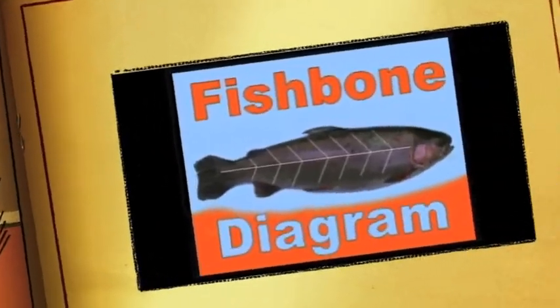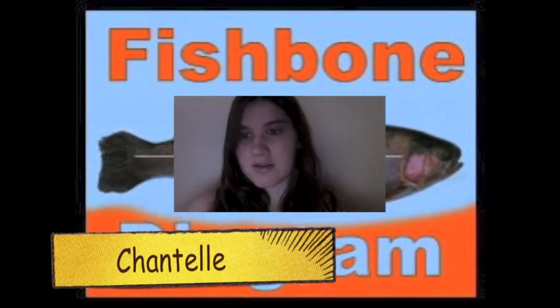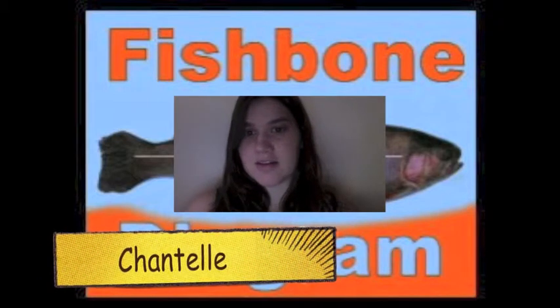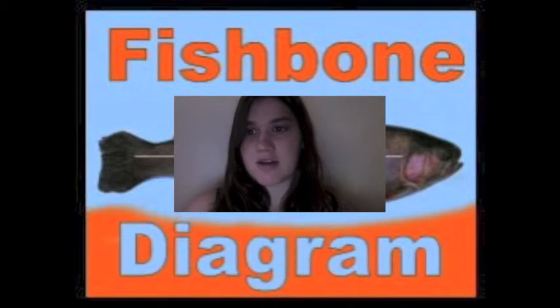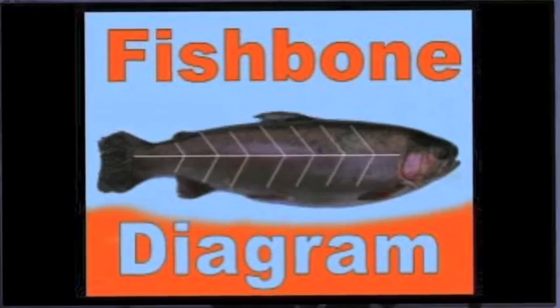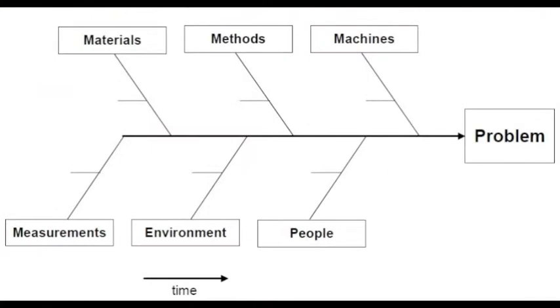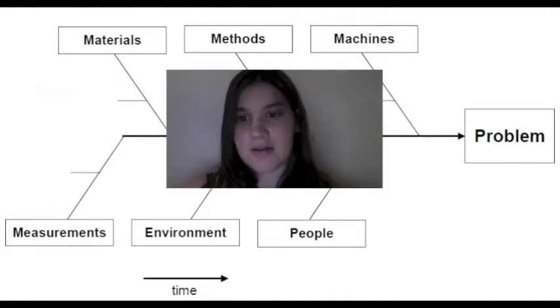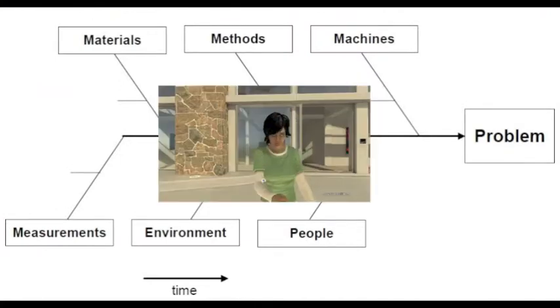Using charts, tables, graphs, and other types of visual presentations can help a team analyze ideas as well as help them collect data. One of these visual presentations that can be used to collect data is the fishbone diagram. This diagram is used to identify the root causes of a chosen problem. The fishbone contains a problem statement written at the head of the diagram. Once the problem is chosen, the major categories are placed. As the team places possible reasons for the problem under the applicable category, they may notice trends and can begin to focus on how to resolve the problem.